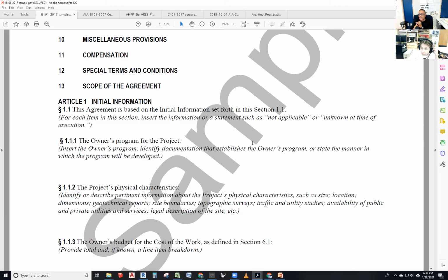This is a term, scope creep, spelled C-R-E-E-P, is when things are getting outside of what they were supposed to be, and they're getting into change order or additional services ground. We don't want to burn the budget. There's another term, burning the fee, burning the budget, meaning we have already spent all the time allotted for the project, and we haven't finished the project. Sorry, Siri is getting in the way. Siri, be quiet. So we're getting ahead of the scope, beyond the scope, and we should be entitled to additional services compensation, or compensation for that additional work.